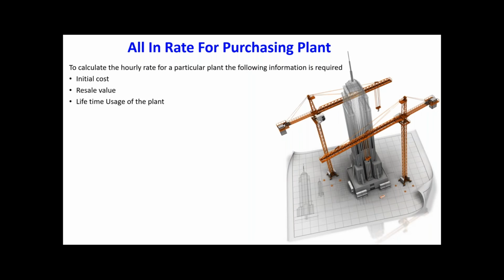Then the lifetime usage of the plant, how long we can use this plant at site. When the usage life cycle of the plant increases, your resale value decreases, but at the same time the cost of usage per year also decreases. Say you are buying a car and selling after 1 year, you have a big loss.